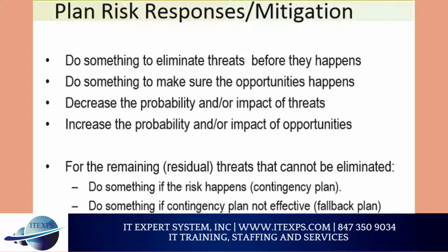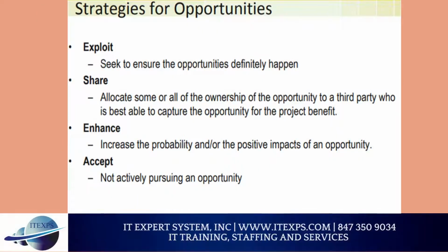Positive risk is known as an opportunity. These are known strategies for positive risks. Exploit, take full advantage, without involving any other party's share. Share, if you need to partner with someone, you should do it. Enhance, after initial investment, if you feel more investment will give you better reward, then do it. Accept, if you cannot maximize, at least get simple benefits.